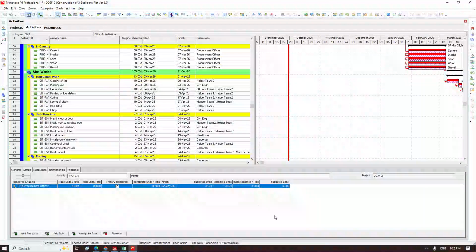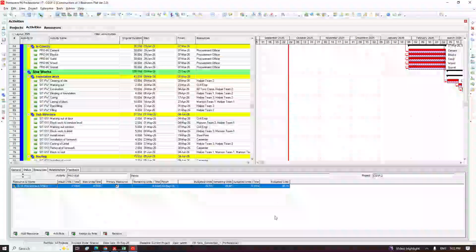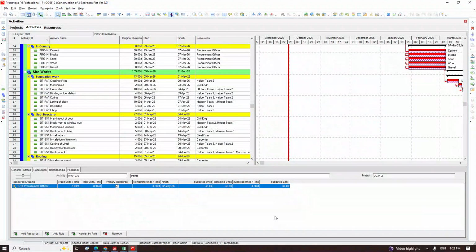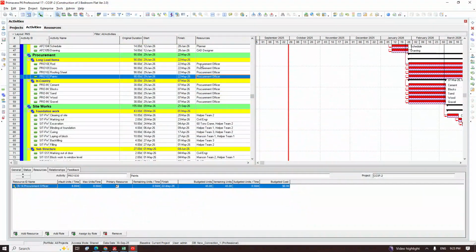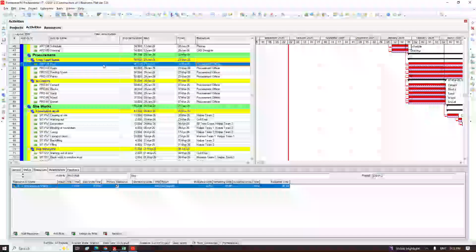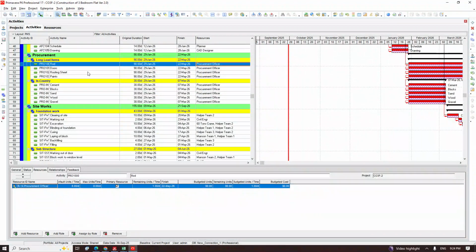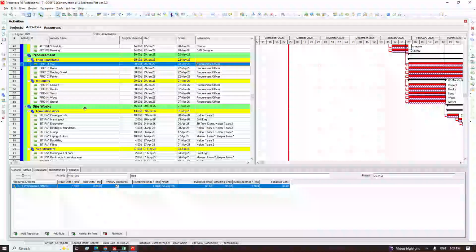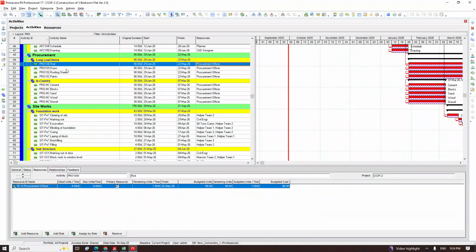We plan that each day they come to work, they are supposed to work for 8 hours. But we find out that the tasks they come to do, they will do different tasks. Like this procurement now, this man coming to work has 8 hours a day. And if he's sending a request for quotation, he will send for all of them at once. So he's not going to spend 8 hours on one, he will just put all of them together and forward the request for quotation.